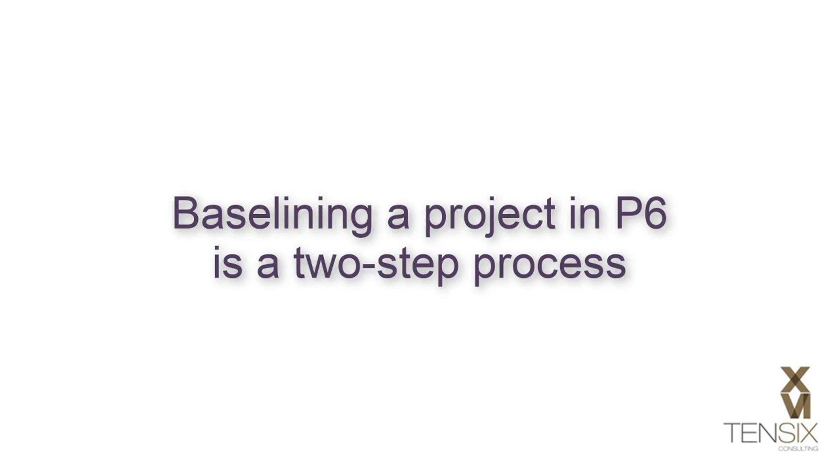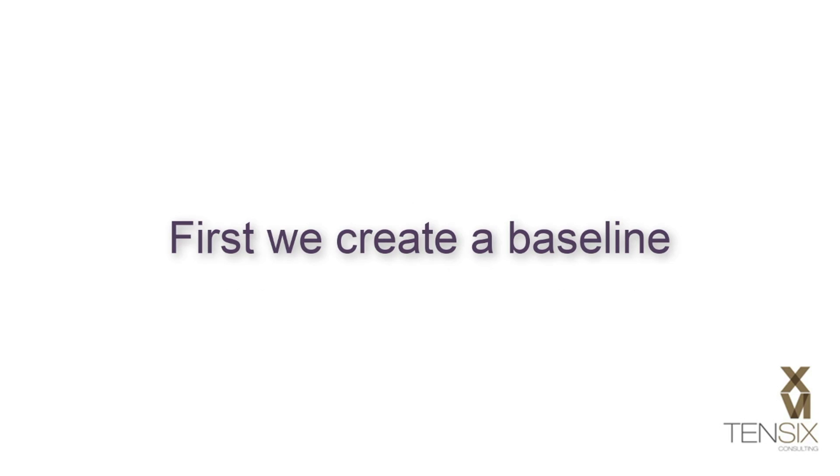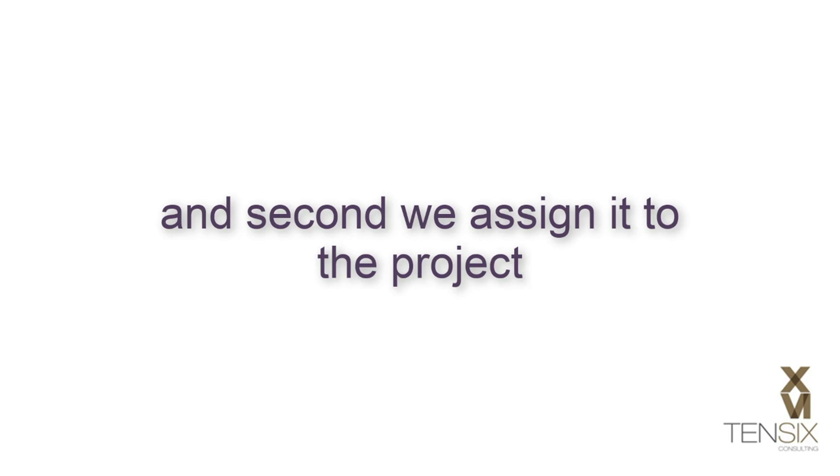Baselining a project in P6 is a two-step process. First, we create a baseline, and second, we assign it to the project.